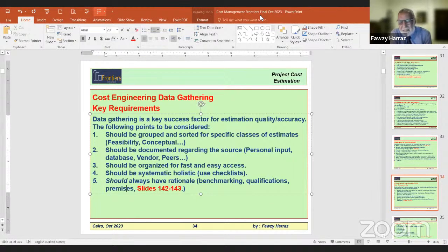The economics may be somehow impacted. But if the contractor's quality and performance, the KPIs are okay, so he's good in everything, except just he took $200 million more, that's the least loss that the owner can take, compared to the agony of rebidding, compared to the agony of suspension and termination. So this will be the cheapest recovery solution, to accept a high price, a cartel price let's say, and go with it. That's it.